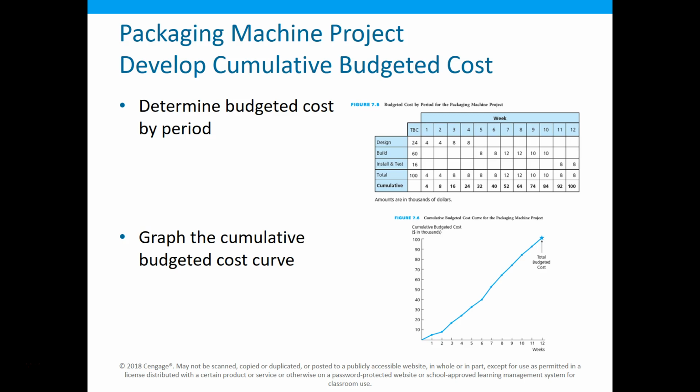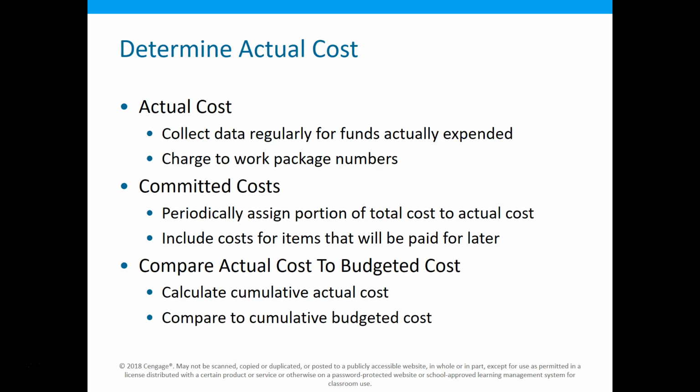No. So here's where it gets ugly, is then we have to figure out what that actual cost is. So a lot of times we derogatorily say the term bean counter, and we say, man, those accountants on this project are driving me crazy. They're not driving you crazy. What they are doing is trying to hold you accountable for when you're spending money, what you're spending money on, making sure that it's allocated to the correct project. So, in fact, on that project then, it's allocated to the correct package numbers or work breakdown numbers, so we know where we're spending money.